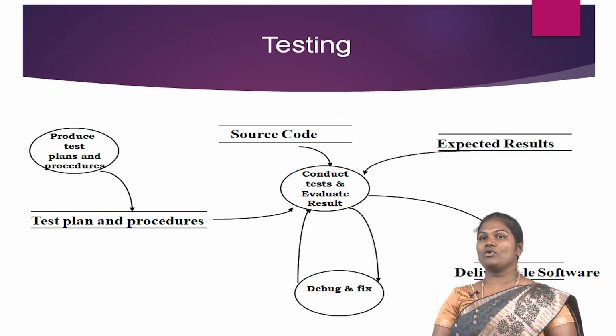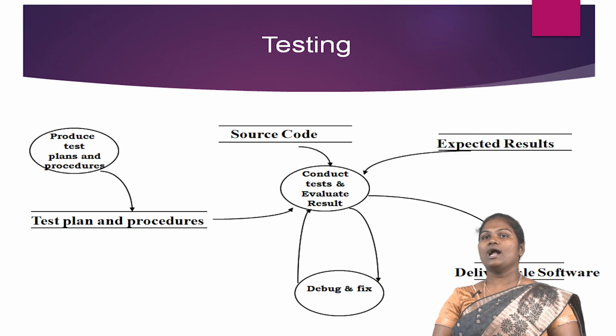Testing is the process of operating a system or component under specified conditions, observing or recording the results and making an evaluation of some aspects of the system or component. Testing should be performed by someone other than the developer. Testing begins with test plans and procedures being produced. The test plan provides managers and test personnel with the necessary approach to validate that the coded module performs correctly and that the requirements of the system have been satisfied.